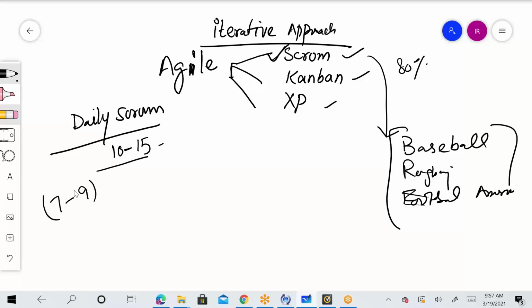You will see teams having 5 team members, you will see teams having 17 team members, agile team. But the best approach, they say, is that for any Agile Scrum team, it is better to have 7 to 9 members, and these 7 to 9 members include BAs, the Scrum Master, who is basically in charge of managing these meetings or communicating everything with the IT team back to the business users, all those things. Your coding team, your testing team, your BA team, all these are part of your IT Scrum team. So approximately 9 people will be participating in this meeting on a daily basis.